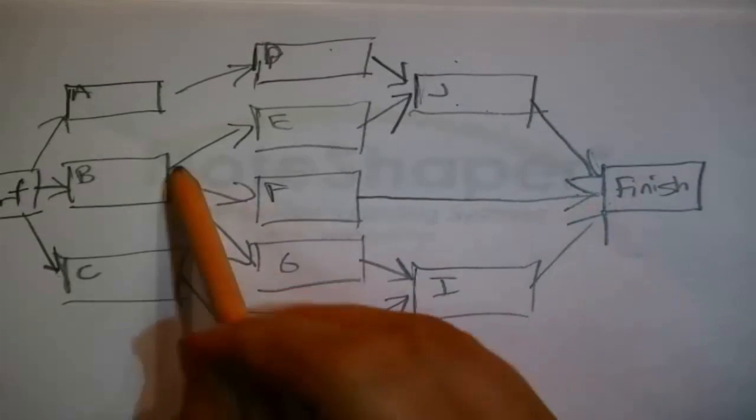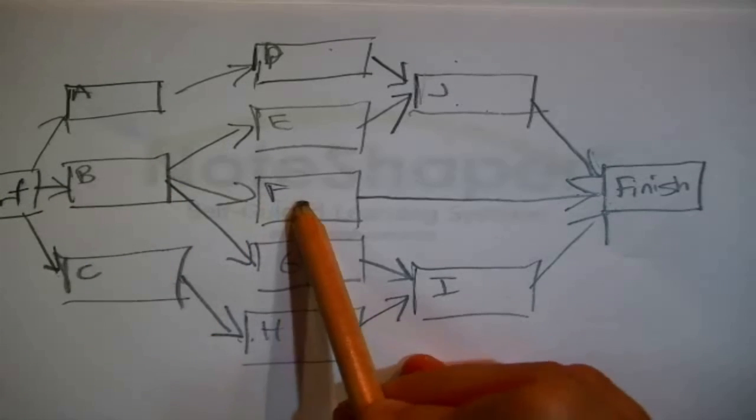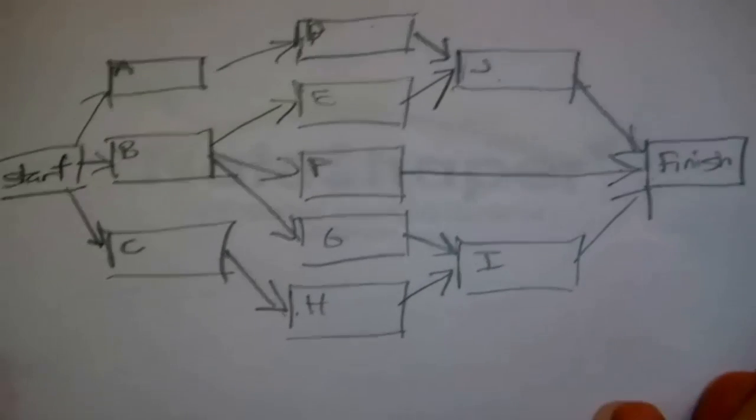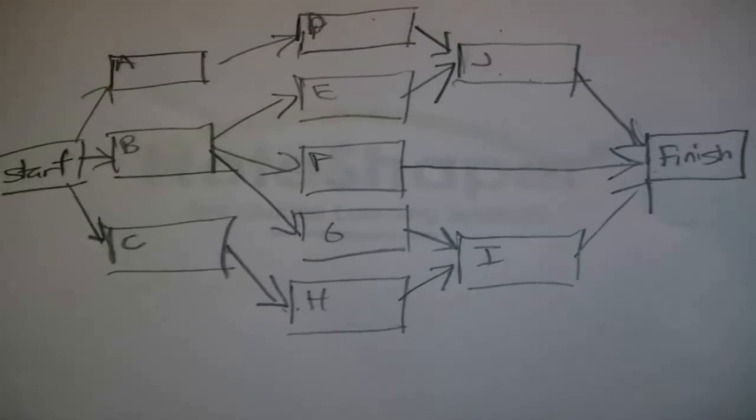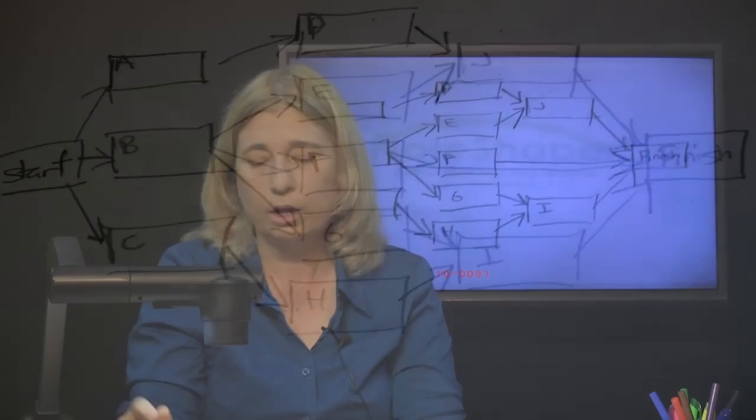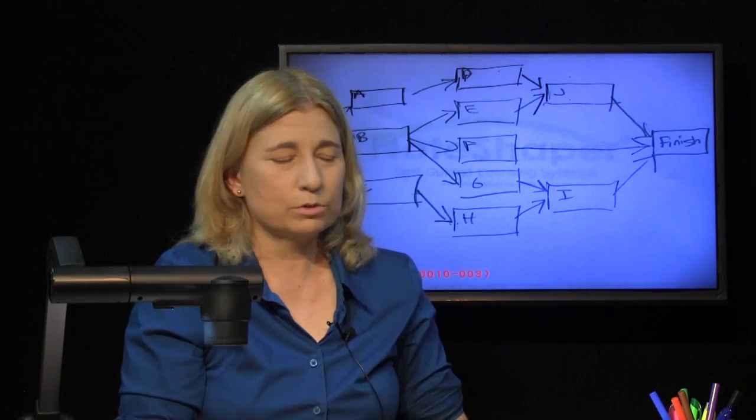But notice that's not always true. F also gets connected to the finish here, because before I drew that arrow you could essentially find your way into F, but you couldn't find your way out. Okay, there always has to be a way out, so to speak.